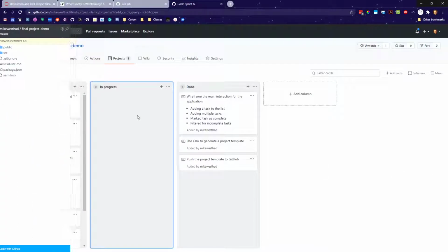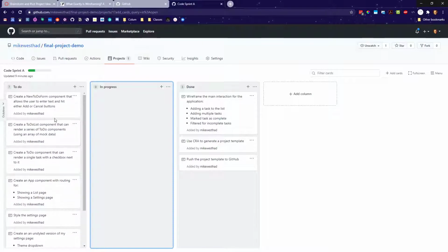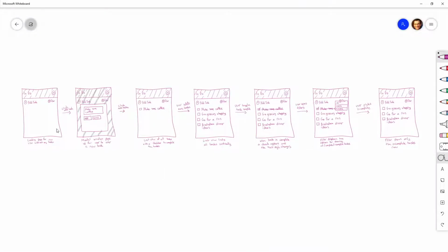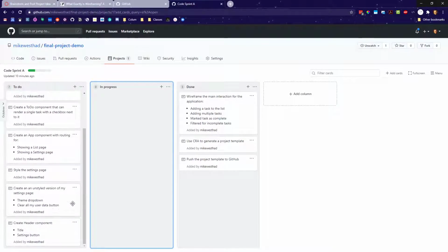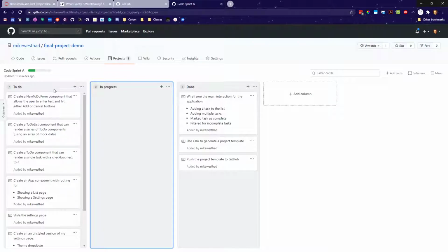So this, I could keep going. There's a whole lot more that we might need to add here for building this application, like adding some tasks that allow me to toggle the to-do component, like making sure that when we toggle it, the styling changes, setting up this filter drop down, making sure that the filter applies to the page. The idea here is just to try and enumerate as many as you can think of for your application. And then once you've done that, come back through here and sort them so that you've got the most important or the highest priority ones at the top.